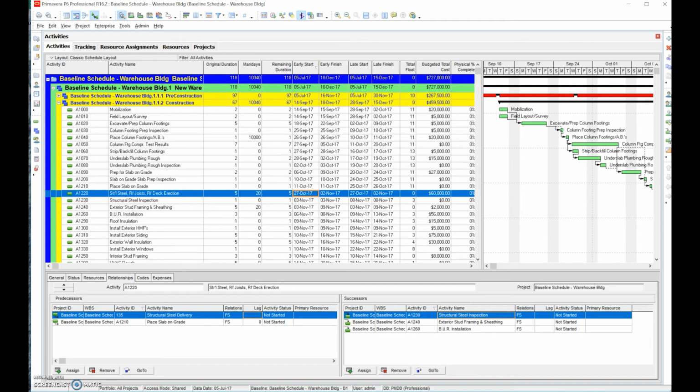but if necessary, you could do that. So now that we have set the baseline, the schedule is done. The baseline schedule is done. So we're going to be moving into all the background, the reports, and different information to show what we have done. But the baseline at this point is done. The schedule is done. So we can move on to schedule updates and other things within the scheduling software. But first, of course, we have to complete the narrative and do different reports to get approval for the baseline. So that covers step number 17, setting the baseline.